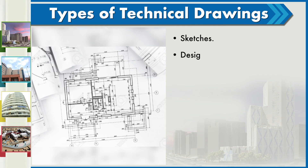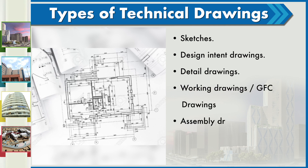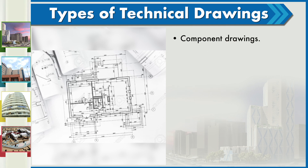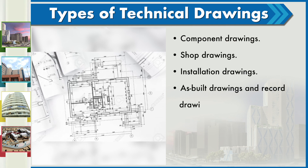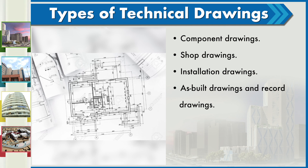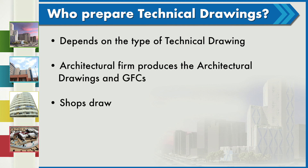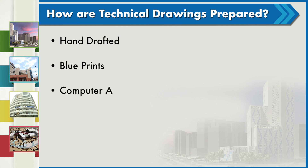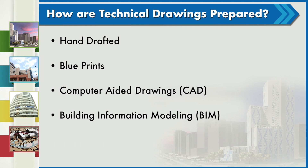There are various types of technical drawings: sketches, design intent drawings, detail drawings, working drawings, good-for-construction drawings, assembly drawings, component drawings, shop drawings, installation drawings, as-built drawings, and record drawings. Who prepares these technical drawings depends on the type. An architectural firm produces the architectural drawings and good-for-construction drawings. Shop drawings are prepared by vendors, and each consultant prepares their respective set of drawings.